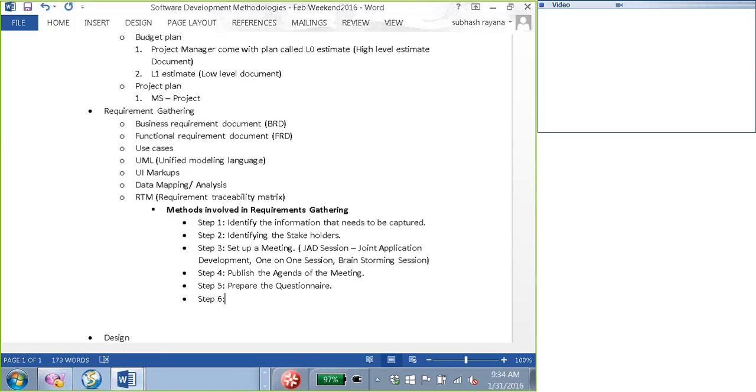So when I was gathering these requirements, the business basically said, okay, this is what they want, when we are onboarding the customer or when we are creating a customer profile in our portfolio, this is the information that we want. And so I documented the requirements, and again I set up a meeting with the compliance team. And they said, no, this is not what we want. We want some additional information to be captured, because by compliance, we have to make sure that our system is in compliance with some anti-money laundering and different compliance processes.